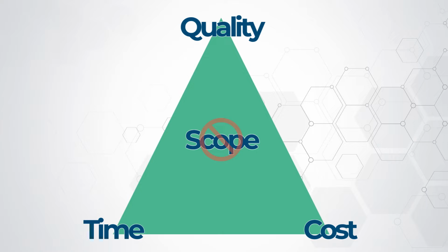Assume for some reason your project is running late and you need to rush things in order to finish on time. You will have to either pay more money by acquiring more resources, or to sacrifice the quality of the product. Another case would be if the quality of the work is not up to expected. In this case you'll either pay more money to improve the work, or slow things down. These are two examples of the conflicts occurring during the project, and it's your job as a project manager to take the right decision each time.